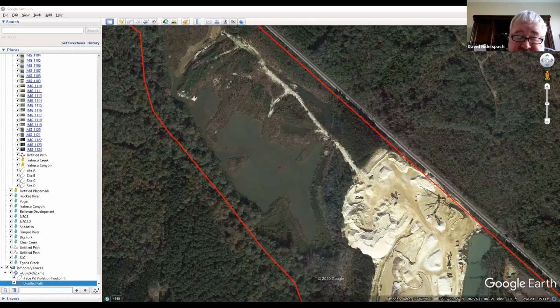I mean, by the time all the markups are done, TTL was paying a lot of money. On the other hand, TTL, to their credit, because they were marking us up 15%, they were paying us immediately and waiting for the money from TTL or from Elmore. So okay. Yeah, that was one of the reasons why they charged it more, is that we were going to get paid whether they got paid or not. Yeah, they weren't holding our invoice till they got paid. So that was what the 5% was going towards, was paying the surety that we were going to get paid. So I'll try to get that clear with him in terms of what the deal is on that.